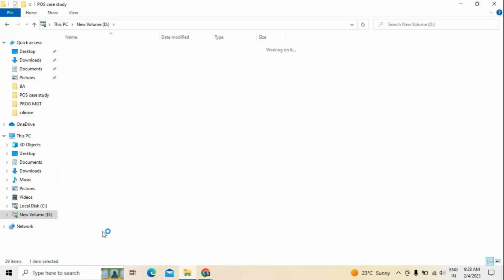Let's say this is the cloud-based application related document. In this, you can see different features were mentioned, right? CRM loyalty, franchise multi-location, hardware in cash register, inventory management system, right? So all these were mentioned. Now what I am doing is taking the different functionalities and converting them into epics. Okay, CRM loyalty is the first epic. This feature I am taking as an epic.